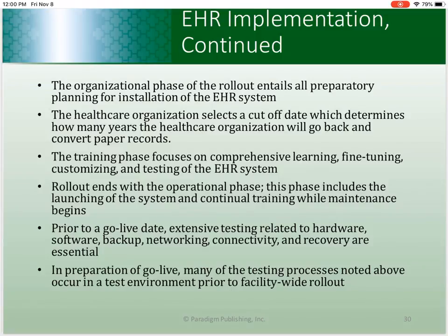All right, now we've got a preparation phase here. A few weeks prior to the go-live, all staff members should be trained. And again, training is going to happen on the job as well, because let's say you train staff for a month and they don't touch it for a month until go-live. Well, they're going to be running around like chickens with their heads cut off. So you have to have continual training, but you do want to give them access to a test environment so that they get that hands-on practice prior to go-live.